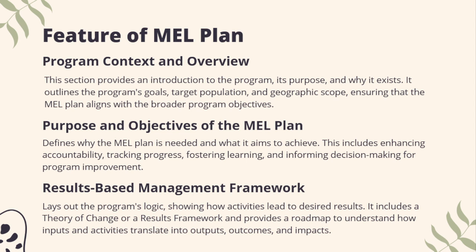The other feature of an M&E plan is the result-based management framework. Under this section, you need to lay out the program's logic, show how activities will lead to the desired results. Okay, so this may include developing a theory of change, a result framework, or a logical framework, which will provide a roadmap to understand how the inputs and activities would translate into outputs, outcomes, and impact.